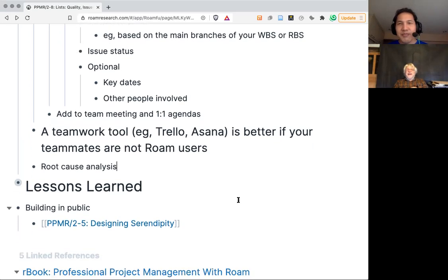It's a big weakness of software, that very often it's by doing things that you uncover problems. When you plan from outside, a task looks like it's easy. And then when you get into the task, you uncover that it's not so easy, because very often the tools are not up to the task, or because the people don't have enough knowledge to do it. That's why Agile was invented.